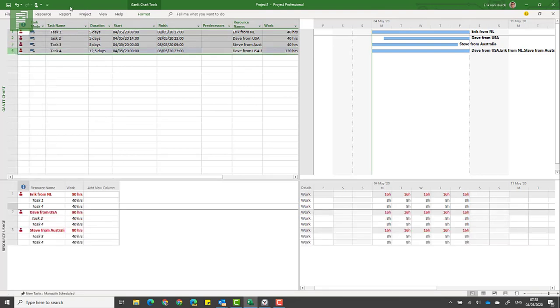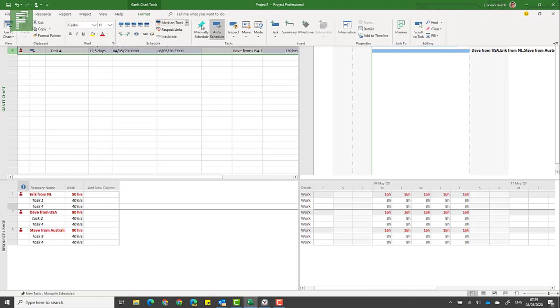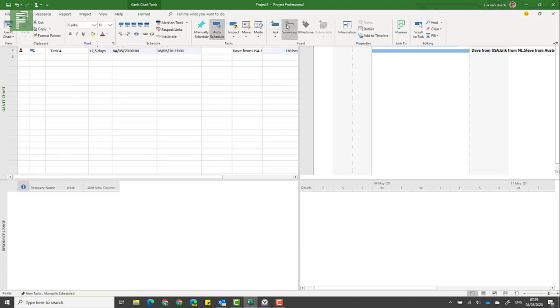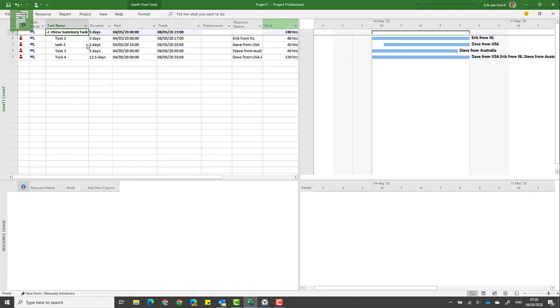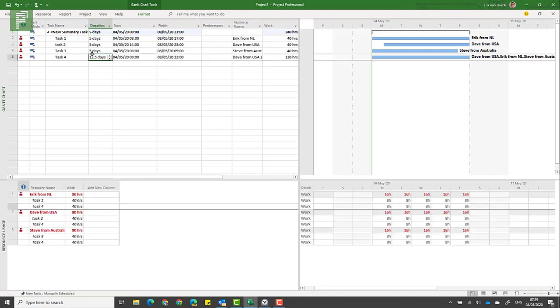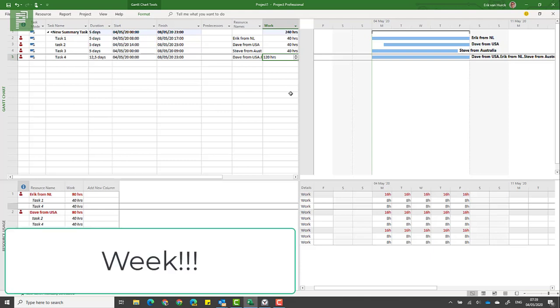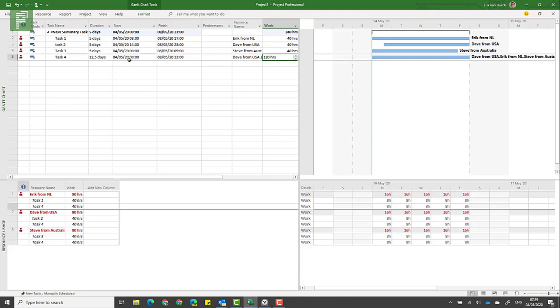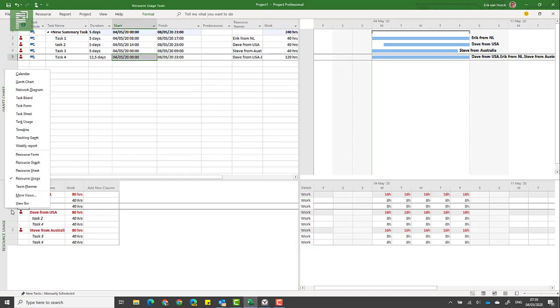It calculates those days as being eight work hours per day. So don't worry, this is still recalculated on a summary level. Let's create a summary task. We go into Task, Summary, and we see that it's still five days here. So don't worry about this strange number here.